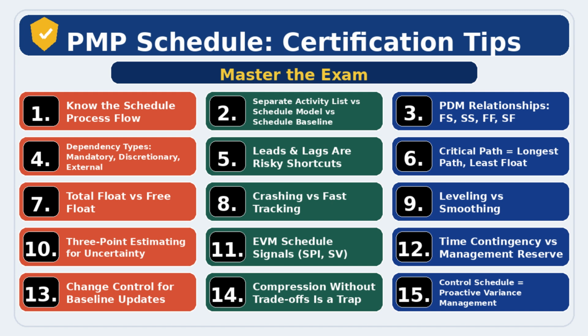An example scenario. Vendor delay risk happens on risk register. Use planned contingency or time buffer. Another scenario. Unforeseen regulatory hold appears. In this situation, you need to escalate, request management reserve, or raise change requests depending on baseline impact.